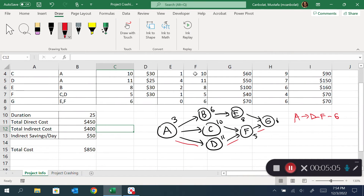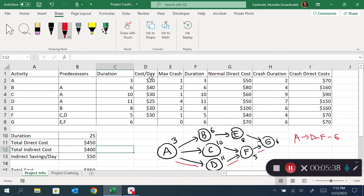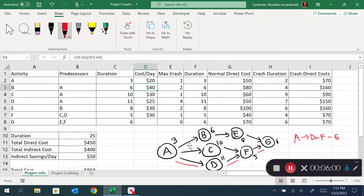Let's focus on which activity we should consider shortening to reduce the project duration from 25 to 24 days. The cost per day for shortening is lowest for activity A at 20 dollars. I also notice that B, C, and E are not on the longest path — even if they were cheap to crash, reducing them would not reduce the project duration. So our candidate tasks are A, D, F, and G.